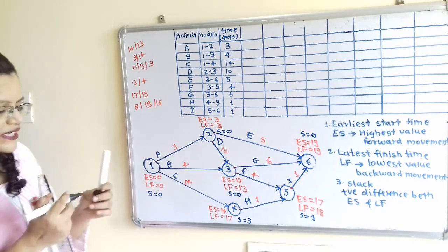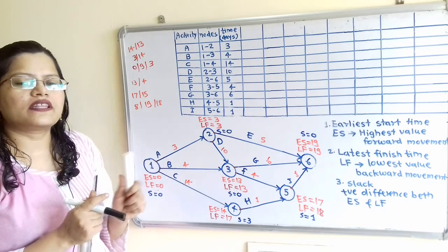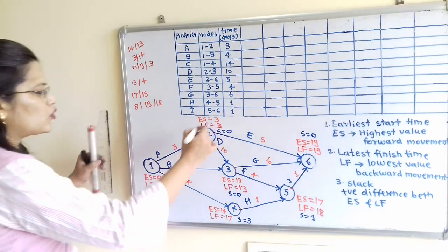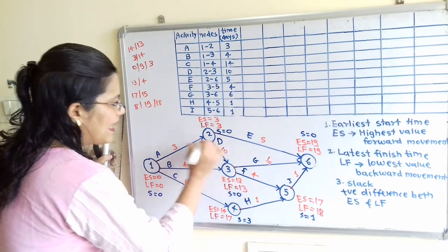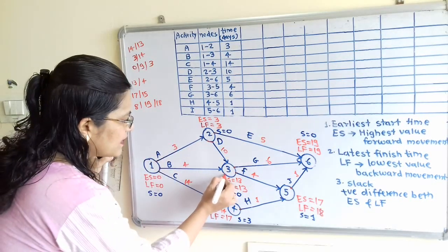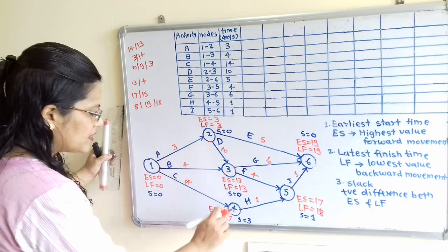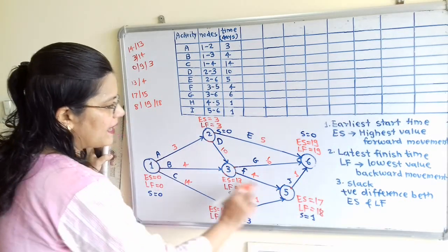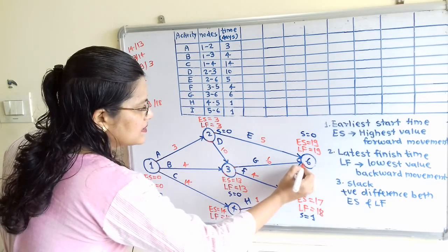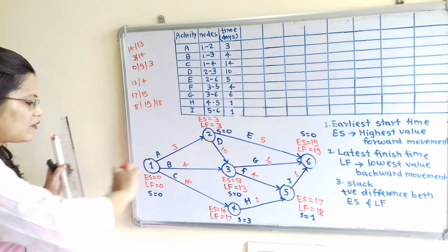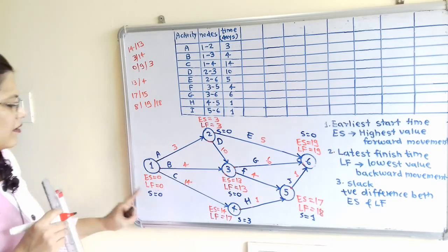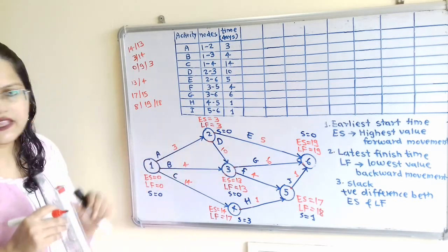Now we have to select the nodes where the slack S is 0. So here is node 2, the slack is 0. Node 3 slack is 0. Then at nodes 4 and 5 there is a positive difference, that is 3 and 1. And at node 6 slack is 0. And at node 1 also slack is 0. Now we will mention all these nodes.